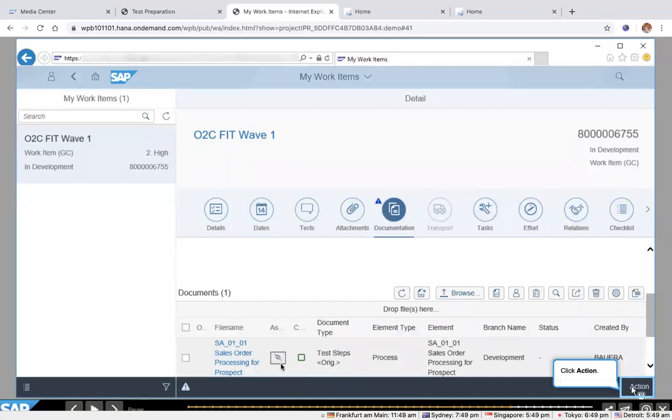Now, why did it appear here? Because this documentation tab already has the business process inherited from the requirement to the work package to the work item. And now we went to SolDoc and directly created a test case. That test case automatically appears here. And then we've just made the association saying that, yes, this test case is needed to test this particular work item, right? And because we have that linkage, we are now able to trace the requirement directly to this test case as well.